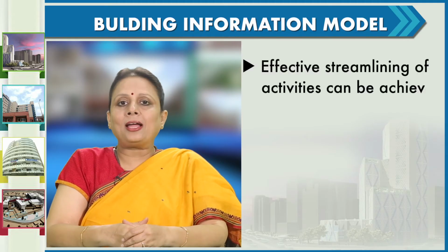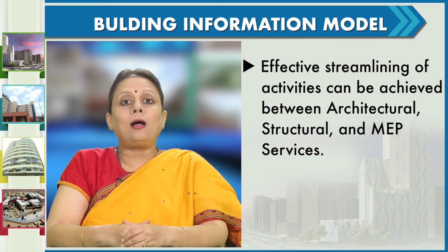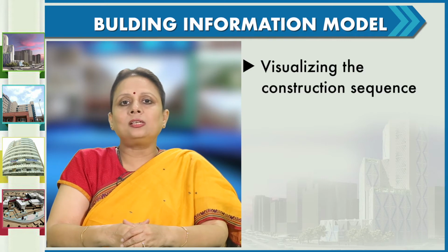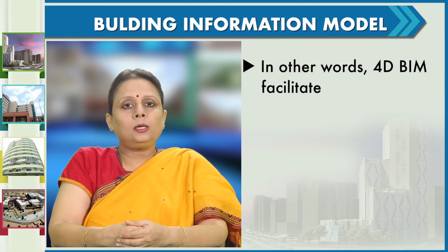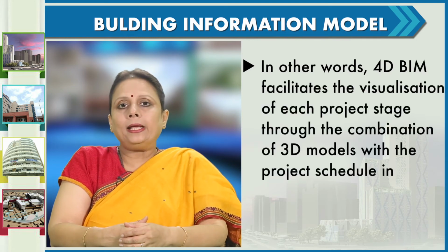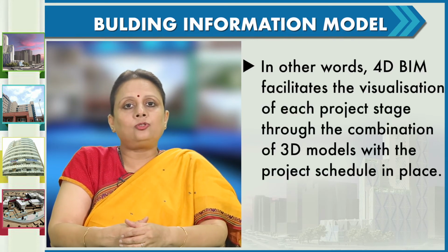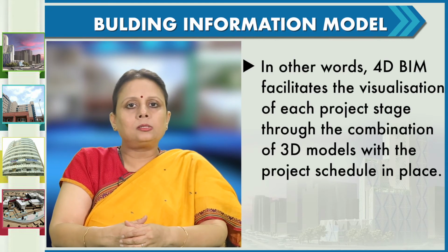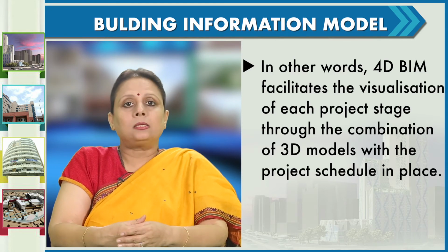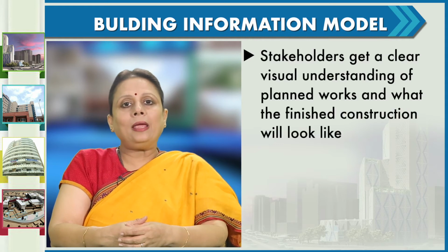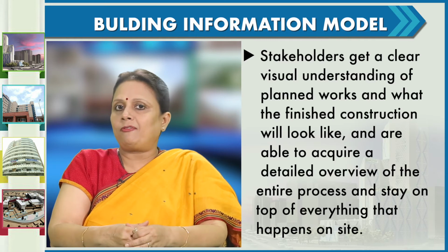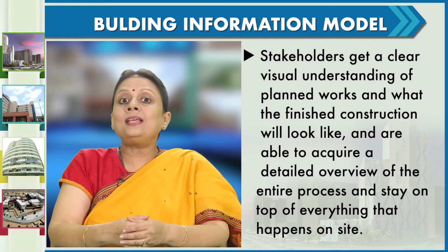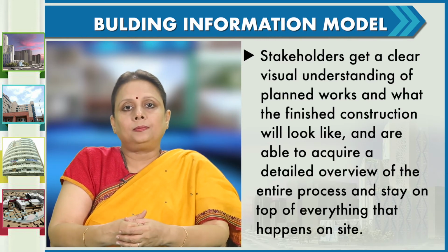Effective streamlining of activities can be achieved between architectural, structural and MEP services. Visualizing the construction sequence can be helpful for feasibility studies also. In other words, 4D BIM facilitates the visualization of each project stage through the combination of 3D models with the project schedule in place. With that, stakeholders are able to acquire a detailed overview of the entire process and stay on top of everything that happens or is about to happen on site.